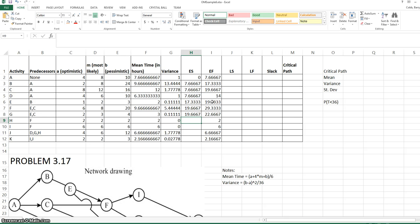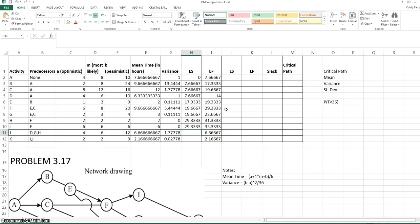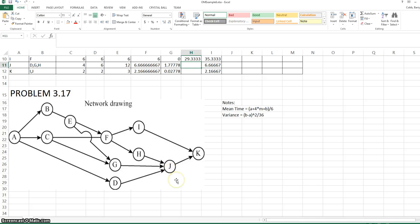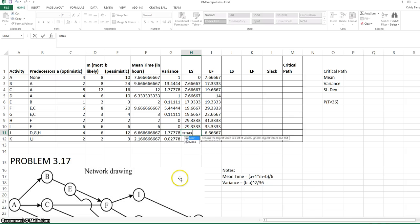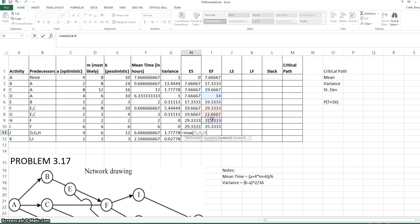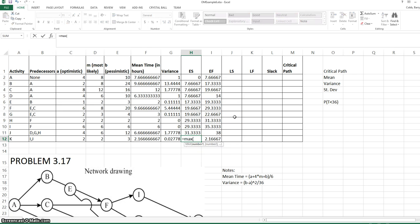The early start for H is equal to the early finish for F, as is the early start for I. J has three predecessors in the network, so its early start time will be the maximum of those three early finish times: D, G, and H. The early start for K will be the max of the early finish for I and J.